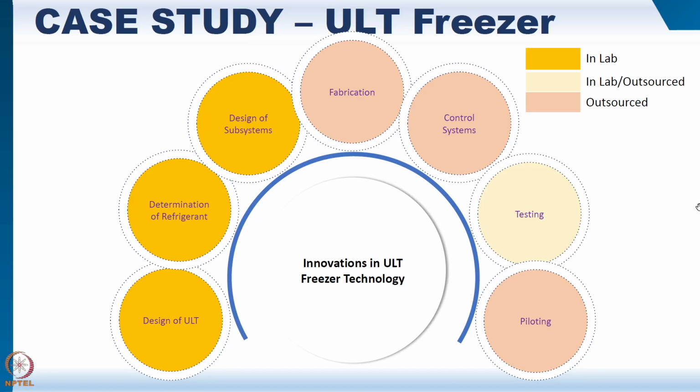So once we have reached this outsourced stage, that means we have reached TRL 6, and now we are marching towards the business development part, wherein we are trying to go into an industry environment, where we would like to develop at least 25 freezers to begin with and see that all of them show consistent results. They are deployed first to friendly customers, taking their inputs, and possibly we will have to make changes. Up to TRL 3 we did in our laboratory, and TRL 5 or TRL 6, up to which we have now gone, was done in a pilot atmosphere, wherein we saw that it sees all the operational and relevant environmental conditions that it will work in, and now from here the deployment would start happening.